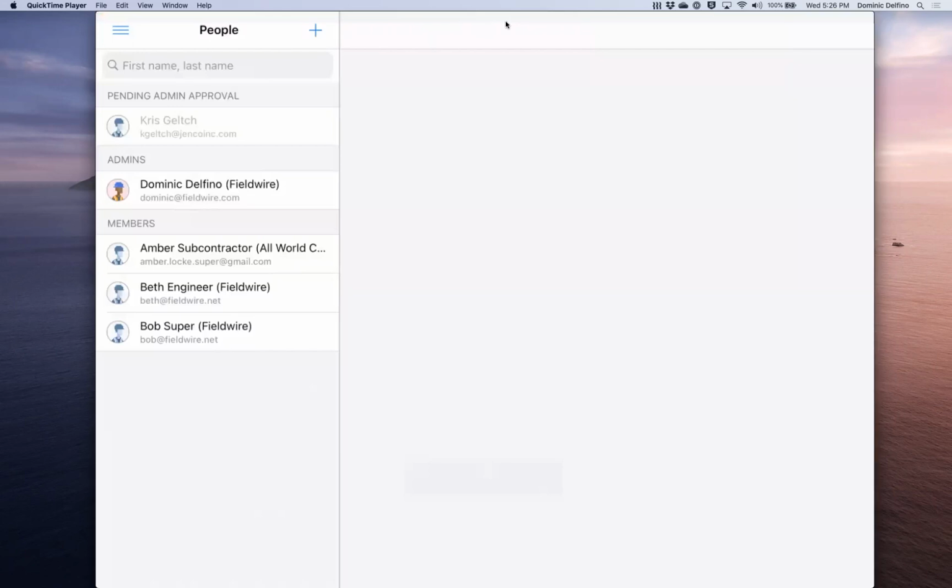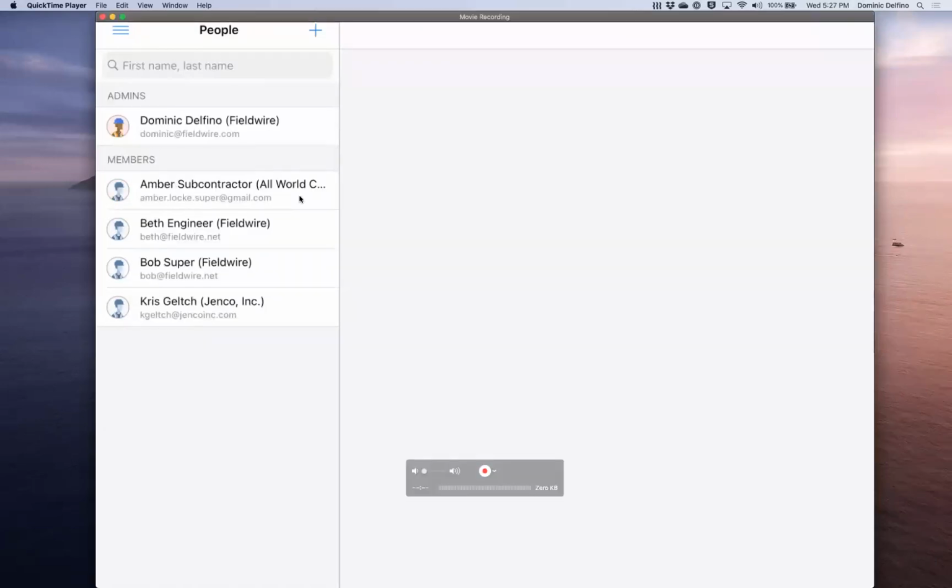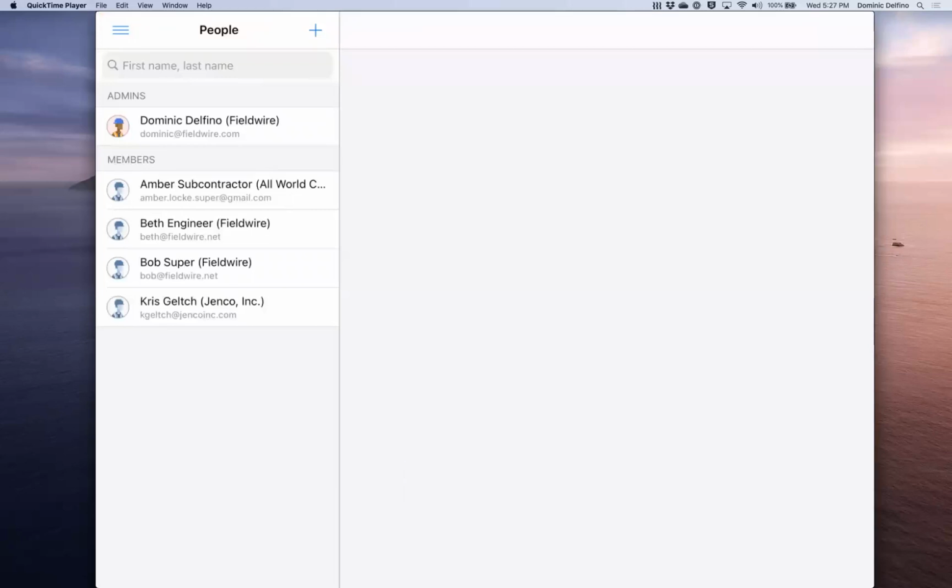And on that note, what we touched on right before Ken asked that question, the watchers, that's a really important feature. You guys are used to being able to assign 6 people to the post in Field Lens, and in this platform, you can only have 1 assignee. So just be really aware of who you're assigning the task to, so that you assign it to the appropriate person, and don't assume that the rest of us automatically see what's going on. Carrie's job is going to have thousands of posts by the time we're done, I would imagine, between the two, just like Optima. Some of you guys have smaller ones, you may have 100 or 200, but I'm not seeing everything.